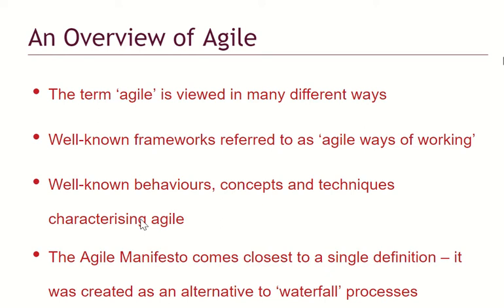Once the person mobilizes you with whatever percentage is agreed, the project starts. In a waterfall approach, the owner of the property cannot make any changes that have not been agreed earlier on.